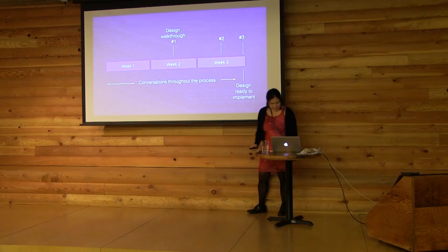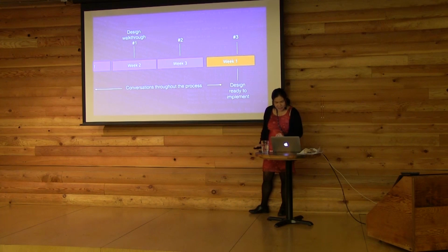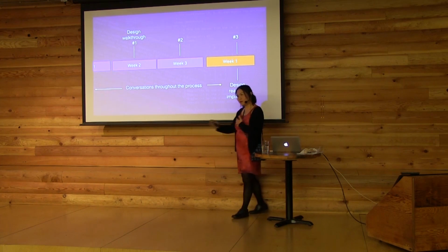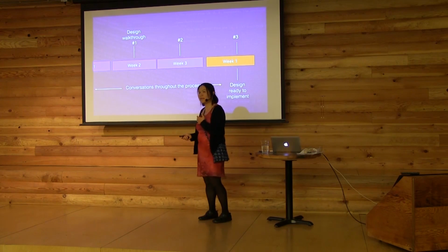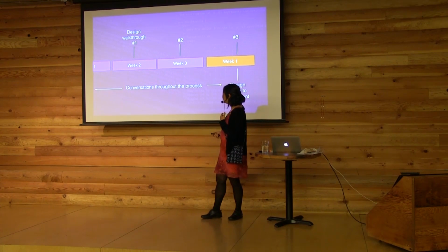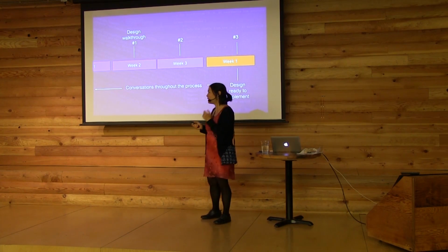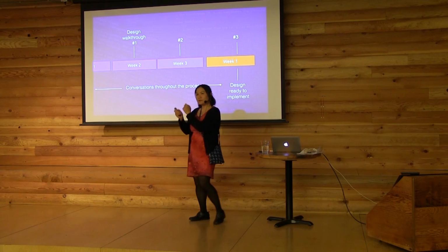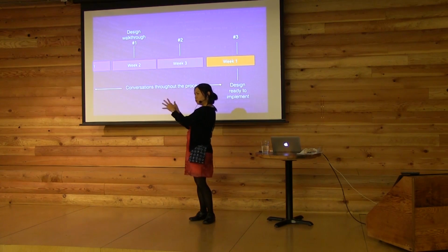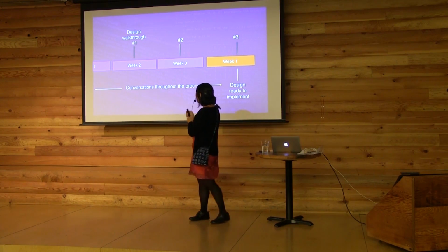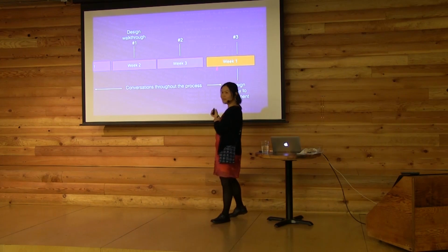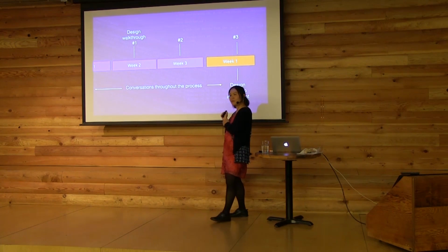And a variation on this, the parallel track approach, is something I really like, and I think this is how it works most often in practice anyway, which is you start the design ahead of time, 1 sprint ahead, but you aim to complete the design in the iteration in which it's going to be implemented, okay?